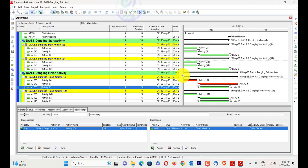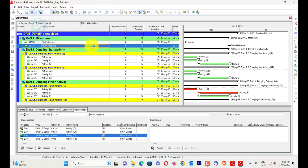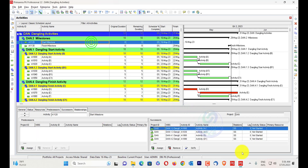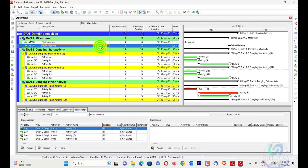We have to remove both dangling start and dangling finish activities. Also, make sure there are no milestones when using the tool, because milestones have only a limited number of relationship types. A start milestone only has start-to-start and start-to-finish relationships, and a finish milestone only has finish-to-finish and start-to-finish relationships. These are fixed relationships, so we cannot assign different types to them.